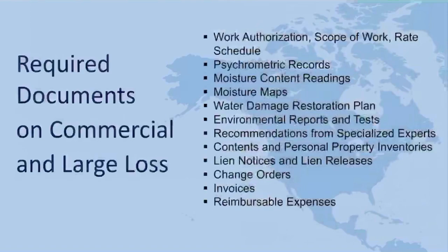And if you don't have your scope of work and your rate schedule and a good general understanding in your contractual work authorization, you don't have what is referred to in a legal sense as a meeting of the minds. And if you don't have a meeting of the minds, you don't have a good contract. It is your responsibility, if you're presenting the contract, to make your contract clear and understandable so that the policyholder, the building owner, whatever you want to call it, can understand it, because you are the author of the contract and you bear the burden of that.